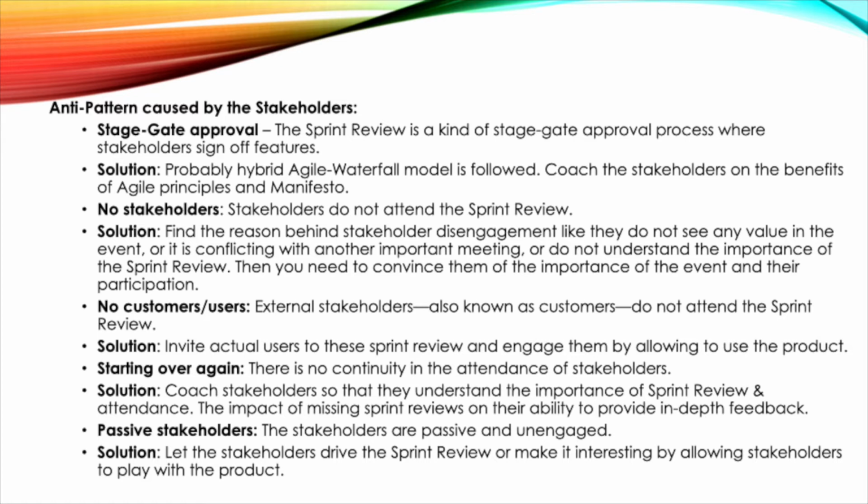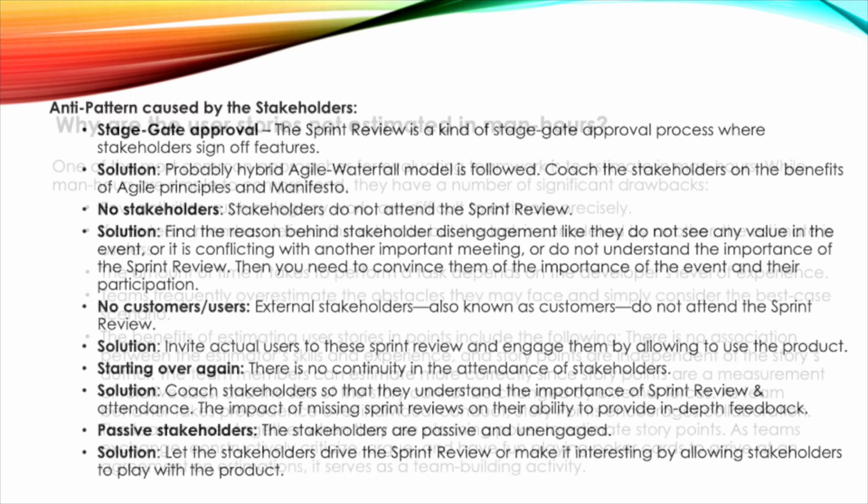The impact of missing sprint reviews on their ability to provide in-depth feedback. Passive stakeholders. The stakeholders are passive and unengaged. Solution: let the stakeholders drive the sprint review or make it interesting by allowing stakeholders to play with the product.